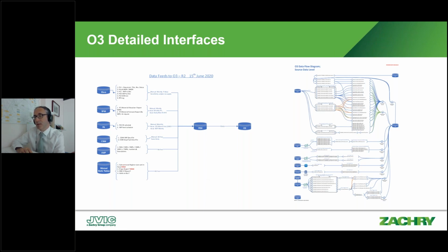Constraint management is absolutely core to the purpose. In order to manage the constraints, anything that stops construction occurring, we want to know about as soon as possible. By bringing in and aggregating the data from the document system, we can put that into installation work packages, and we can constantly, through feeding the data from the document management system, see the revisions of the documents and what the revision status is. So is it issued for construction or is it issued for review? From those statuses, we can either automatically create a constraint or close a constraint.